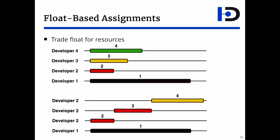But you can have near-critical activities or activities with a high level of float. In this case, I'm even doing color coding of float. Imagine that this is some kind of timeline representation of activities and I have four activities. If all four activities can start at the same time, I could use as many as four developers, just assign them one for each activity.